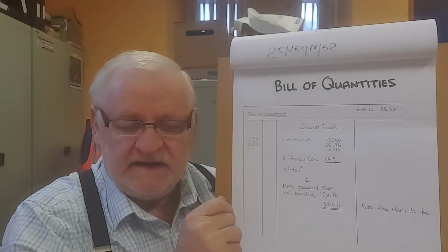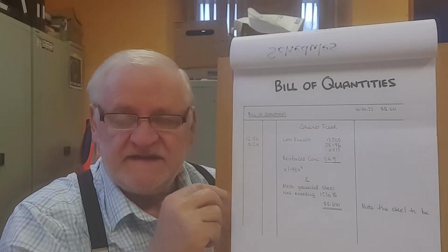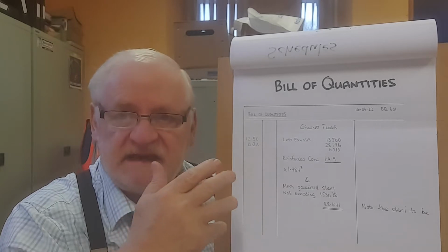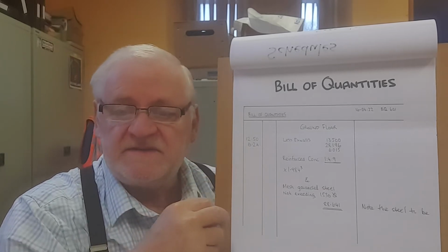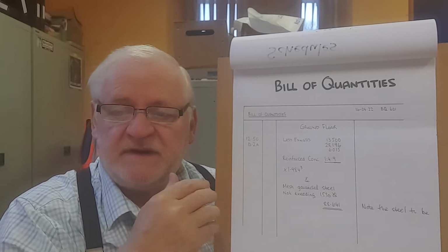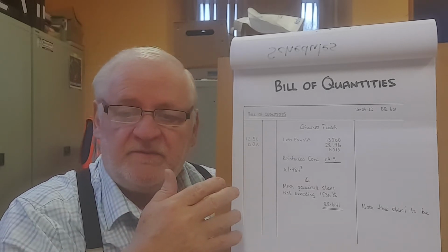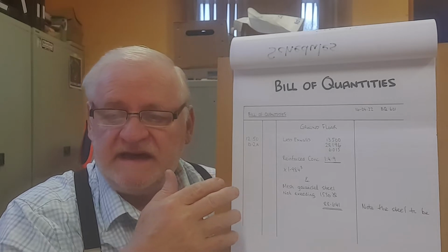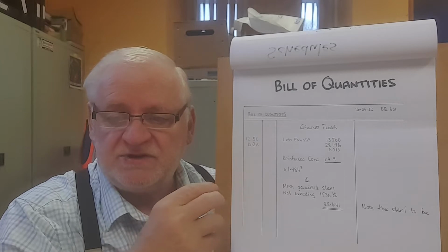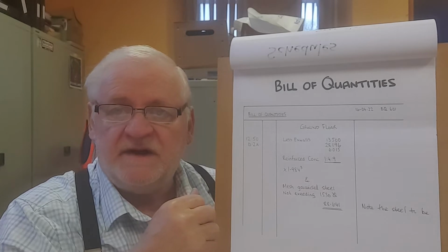Now, there's different types of price. There is what's called a preliminary price. This is the work necessary to begin establishing what the final price will be. Then there is what's called the preambles. And the preambles are statements which express the agenda or describe the accompanying documents. And therefore, the preambles in the Bill of Quantities refers to the tender letter that gives a description of the materials required for construction. It gives quantity, type, characteristics of the materials required.